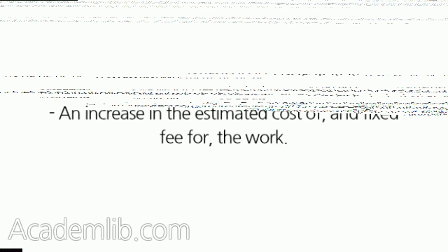Once a contractor has identified a problem with GFP or its delivery, it should be advised to submit a notice, in writing, to the CO. The following might occur. The contractor's right to claim contractual adjustment in these circumstances is granted by the government property clause in the contract. The contract adjustments that the contractor is entitled to claim include an extension of the time for completion of the contract, an increase in the estimated cost of, and fixed fee for, the work.